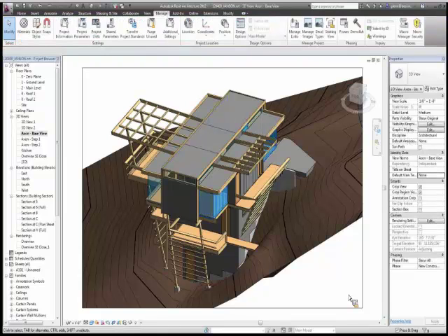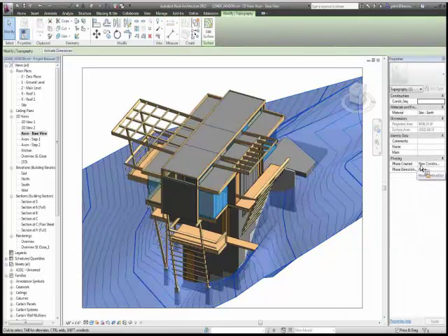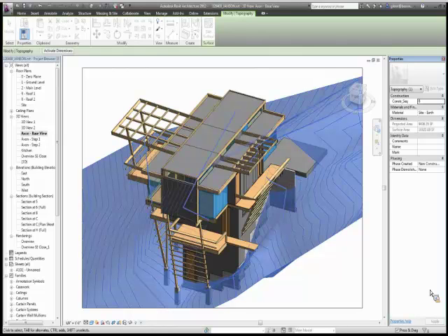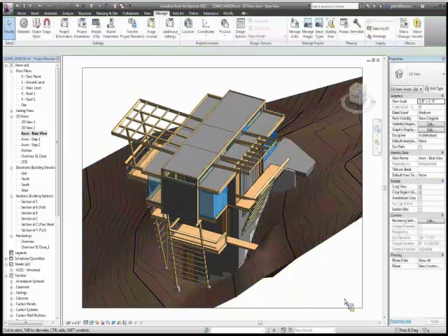So a big piece of this is just setting up the sequence of operations and assigning it. Like this thing over here with the floor, or the topography, maybe that is 0 or something like that as the base. And then that backfill piece would come in as a higher number later on. So the idea is to go through and assign these different numbers. And let's think about how you could use that. Because if you can assign these different numbers, then we can start setting up filters to display just the pieces you want to.